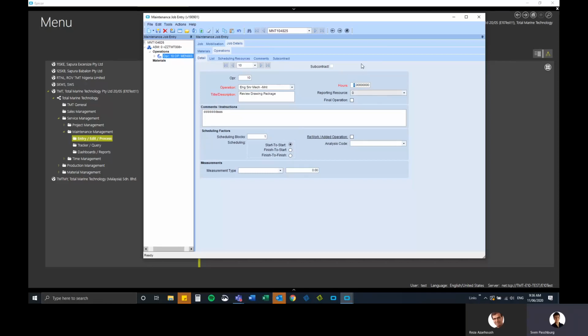and you must also set an estimated number of hours. You may not know exactly, but it's required for you to estimate, say, it's going to be 10 hours. If they reach the 10-hour mark on their timesheet, it highlights red, no worries. If they feel they need 5 hours more, you come back in here and add 5 hours more, or you create a new operation and close this one. That's how you deal with changing estimates of hours. So that's creating a standard operation.